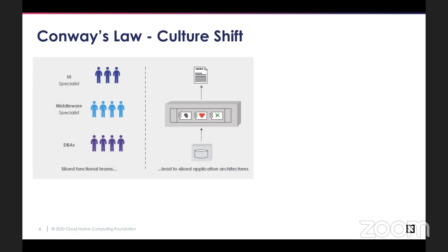And typically there used to be a handoff of what needs to be done by the product management or project management, and then that goes down to architects that have to define the interfaces by working with some of these specialists, and then there used to be a handoff from one team to the other. This resulted in a lot of slow development processes. Sometimes the releases would take a year, or even longer.